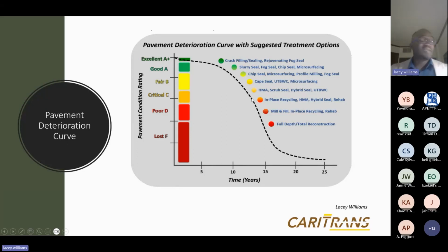So what that means is that by the time we observe, we issue the instructions to design, go to tender, etc. By the time we close that process and the contractor is on the ground, we are usually in this area here. And I kid you not, I have actually experienced this in the 20-something years I've been in practice as a supervising engineer.